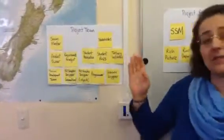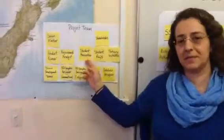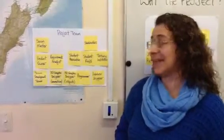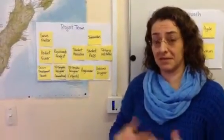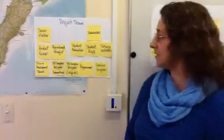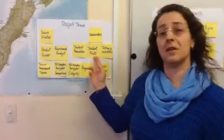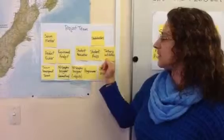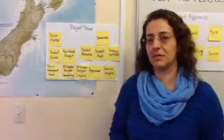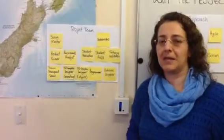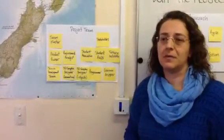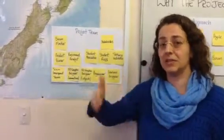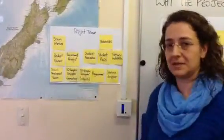We have stakeholders, namely the student association, who has commissioned IdeaWorks to create this build. Their budget is $150,000 to complete this project over six months. We will also have student representatives to look at the build and do some testing, as well as the tertiary institution itself. The University of Immersive Education, based in Wellington, will be paying for the space that this 3D virtual world will reside in, and they will also need to pay an ongoing rental fee in future years.